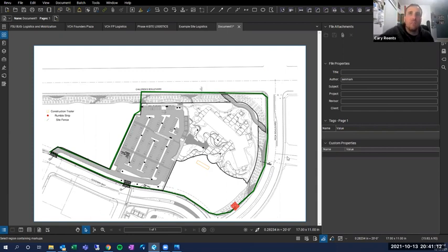I would say probably by the time we really broke ground and got everything up, I changed it about 3 times in some fashion, because I originally played with the idea and the schedule of actually paving the entire project before we even started foundations to get out of doing our SWIP requirements and leaving certain sections of curb and gutter out. That adjusted our logistics plan, but we abandoned that and went back to the original concept. So about 3 times before I finished. Still a living document, more or less.